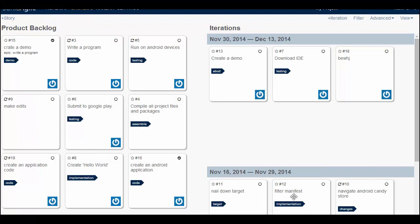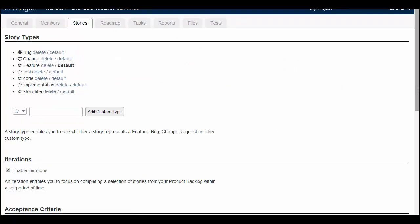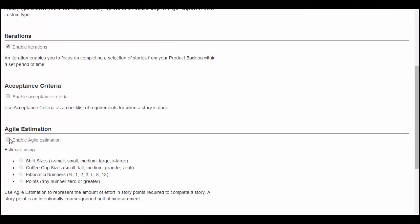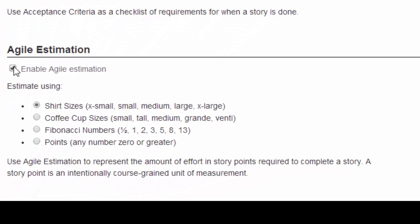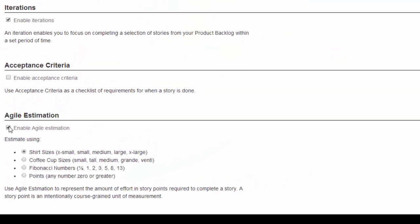The another feature is Agile Estimation. I can estimate the amount of work that is required to complete each story by going to settings and then stories and enable Agile Estimation. We can estimate using shirt sizes, coffee cup sizes, some numbers, points, etc.